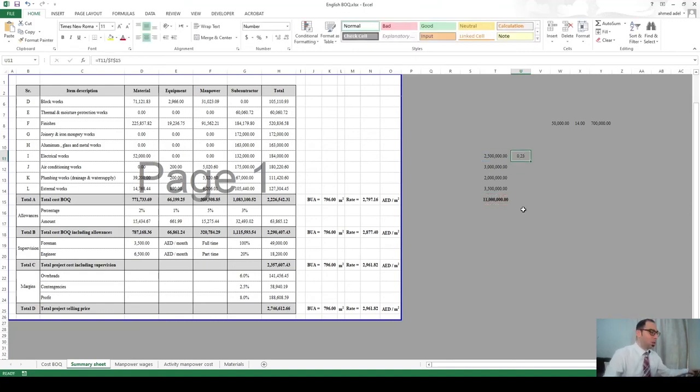Like the first one is 23% here. Now in terms of value, let's say, okay, this project is 23% of my total company work. This project is 27%. This project is 18%. This project is 32%. So this is the biggest project. He will bear the biggest amount or the biggest portion from this indirect cost or these overheads. So if I come here and I'll say equal to the percentage into this, this project should bear as an overhead an amount of 159